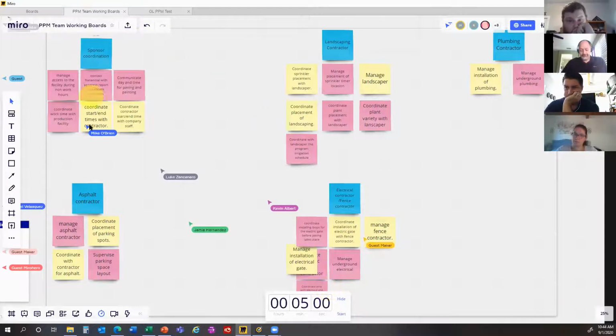Part of this is understanding that what you want to do is start building a common project phasing that you do on all your projects. Eventually, and it doesn't take very long, after probably a handful of projects, you're going to see some commonalities between all the projects. Those pieces you can just make standard templates to drop in on any project. Does that make sense? Yes. Okay. So those are all things you're going to add. Don't worry, you guys are all going to have time to add stuff to each one of these projects. Again, we're only focusing on the introduction piece.